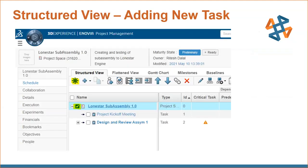When creating a task, you use the icon to add it, and there are several icons at the top to add people, deliverables, and dependencies. You also have different views: a flattened view, a Gantt chart view, and a milestone view to see all milestones. Once all tasks are added, you can promote the project from a preliminary state to a ready state, and then you're ready to go.